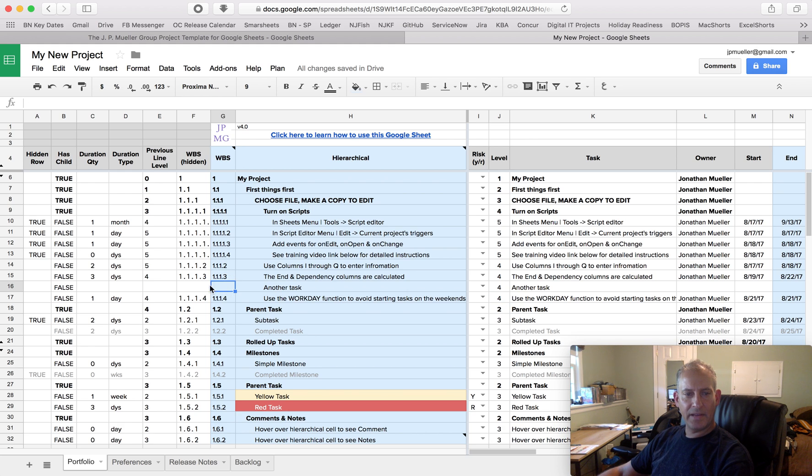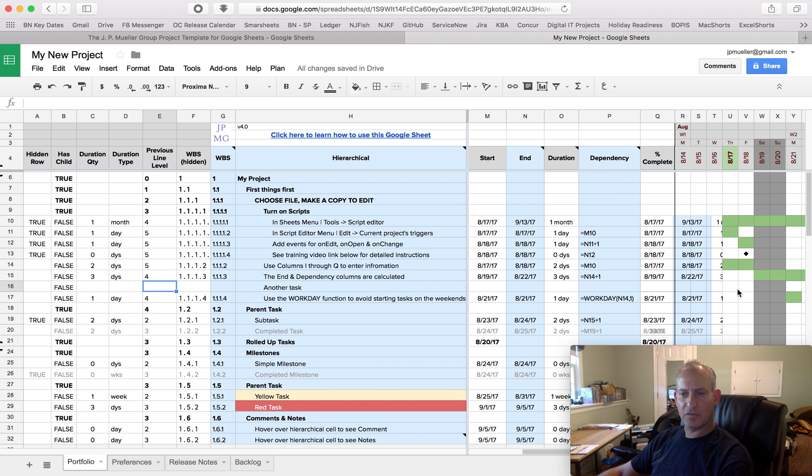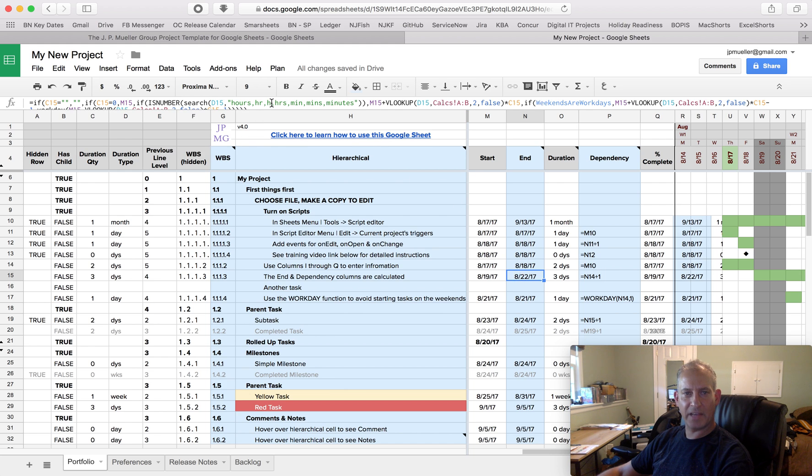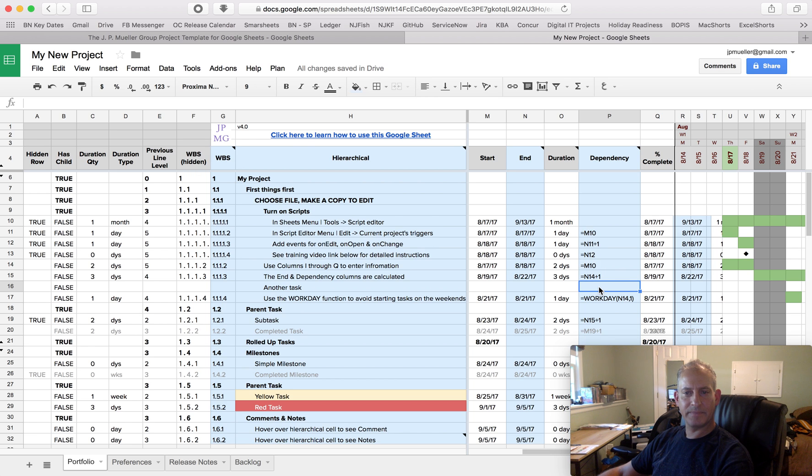And that's blank because there are formulas here, if you look, that don't exist in the new line. There's also formulas in these columns that don't exist. So you'll notice that the end date is normally calculated. It's a big, hairy formula. And it doesn't exist in the new line. Neither does the dependency column.